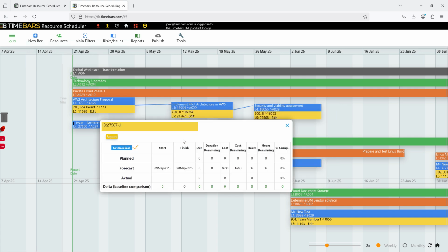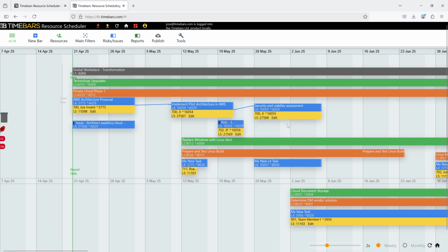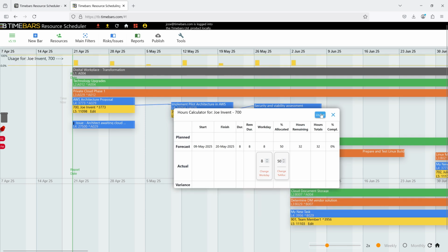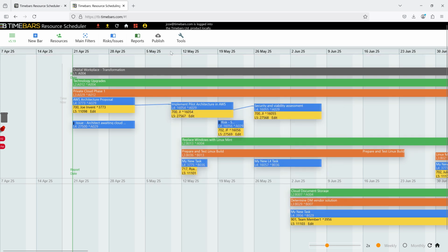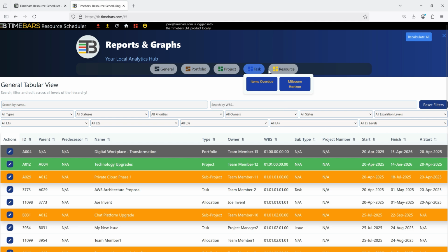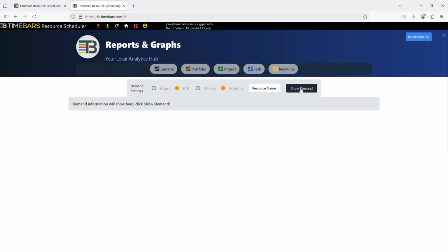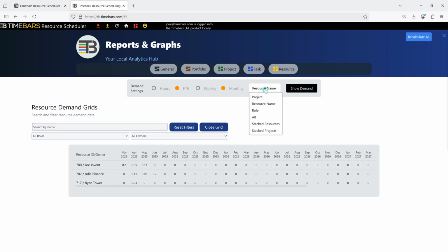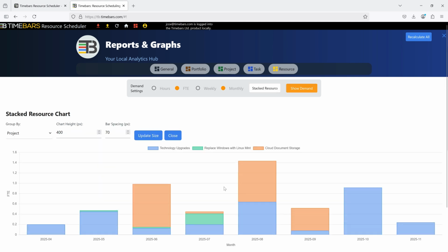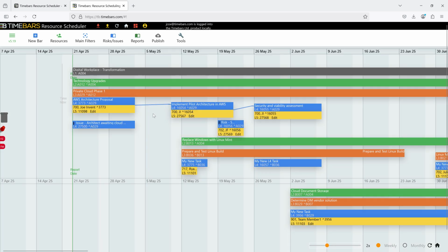Yeah, seems really useful. And it also lets you visualize resource usage across the timeline. Why is that visualization so important? Well, seeing who's assigned to what and when helps you spot bottlenecks before they happen. You can see if someone's got 3 tasks all due in the same week. It helps prevent overallocation. Right. Burning people out or creating impossible deadlines. Exactly. The document calls it ensuring optimal workforce distribution, making sure the work is spread out reasonably. That proactive view can save a lot of headaches down the road.